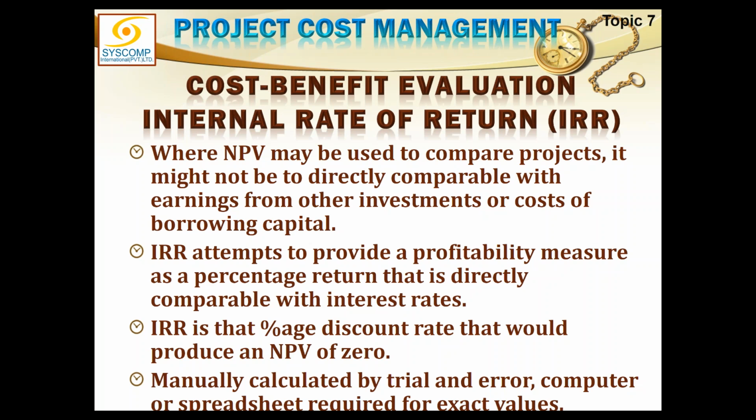13.278%. The point where I get exactly the 0 value, that is called the internal rate of return. So that means my business can yield 13%. This is a higher rate than the bank, or it can be even much higher than that. You get this point? Yes, sir.